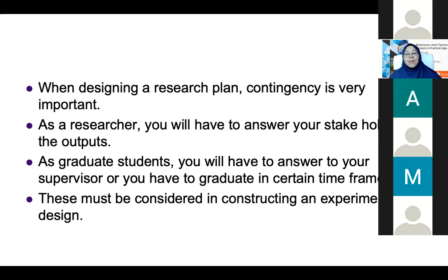What we did among our researchers is we borrow first. Let's say my friend has that material, so I say I'm in the process of ordering, so may I use your materials for a bit, and whenever mine arrives, I just give it back to her or him. That is the kind of contingency you can do.